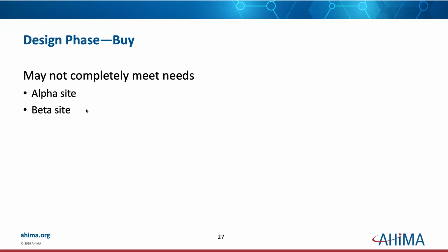Things you have to remember about buying is it may not completely meet your needs. Most places get a vanilla system and they don't pay for a whole lot of enhancements because it gets expensive every time you do an upgrade, because you have to upgrade each one of those enhancements, and it takes longer, more expensive, you have more chances for glitches and problems and breakdowns and all sorts of other things.